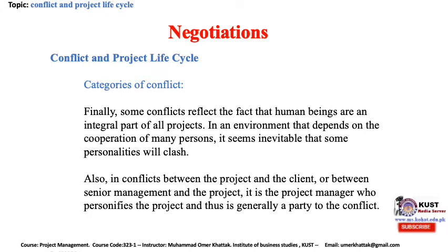Underestimation of cost and time is a natural consequence of this practice, and it leads directly to conflict between the project manager, as a representative of the project team, and senior management. A second consequence is that the project manager tries to pass the stringent cost and time estimates along to the functional managers, whose units are expected to perform certain work on the project. More conflicts arise when the functional managers complain that they cannot meet the time and cost restrictions. All this tends to build failure into the job of managing a project.